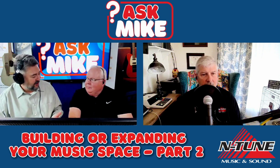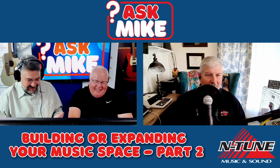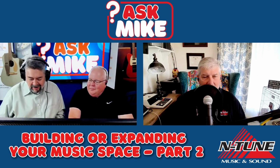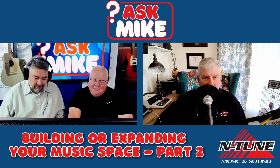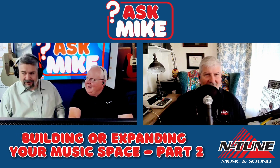And then they've got to hire a test and an abatement. So sometimes when I was working on a project at Abilene High, they said, well, we just want that door to be moved a few feet over and made a little bigger. I said, that will cost about $8,000. They're like, how can that be? It's just a door.